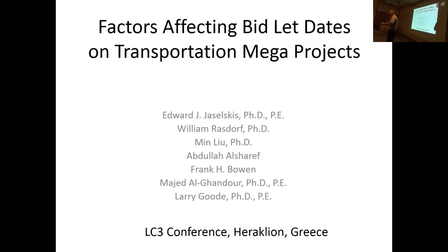So what this project is all about, we were hired by the North Carolina Department of Transportation to look at helping them predict what they call payout curves. If you're on an owner's side, owners have to predict well in advance how much money they're going to need for their future construction projects. It may be 3, 4, 5 years out, even before the construction project begins.